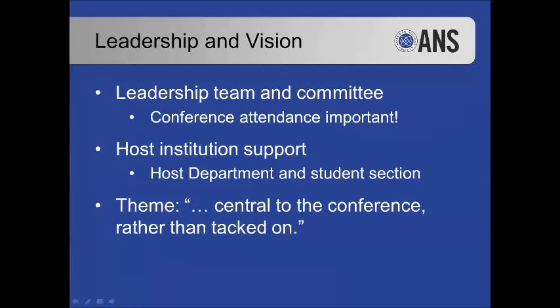especially as things start to come together. But you need people who are going to be in this process for the long haul. These days, the shortest one of these cycles would be maybe writing your proposal for a year and a half before. If you're successful, then you've got another year and a half of planning to do before you actually reach the conference part. So we're looking at a minimum of 2.5 years of people being involved with this process, and sometimes longer if your first bid isn't successful.